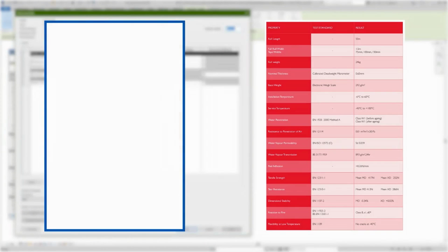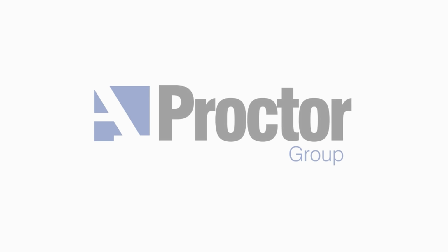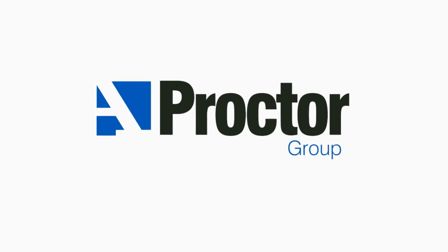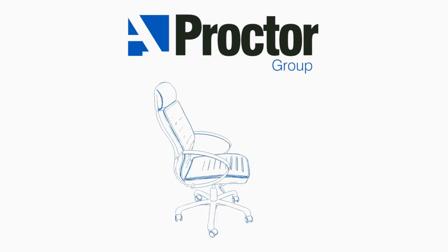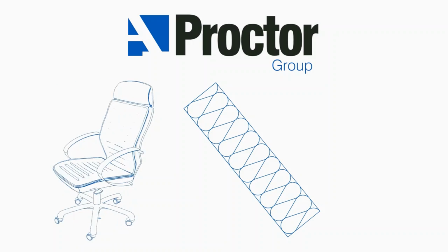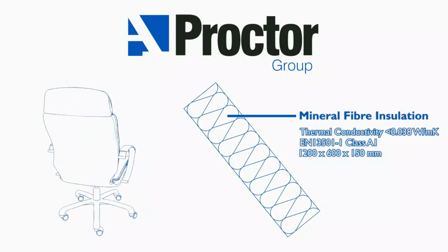But there is another alternative, which is product data. So this is allowing the design team to use generic objects, but supplement it with the data specifically about your product. So whether that's about fire doors, different fire ratings, different glass ratings, weights, those kind of things, we can start pulling that in. In terms of making the decision between modelled objects and product data with Proctor Group, my approach was to come and talk to the team here, because it's not a classic decision. If it's something that's very spatial, like a piece of furniture, objects very much play a part in that decision. If it's something that's totally embedded and never seen, never maintained, and doesn't really have that bigger impact on the design process, then data matters more, because it's about getting the right data handed over at the end.